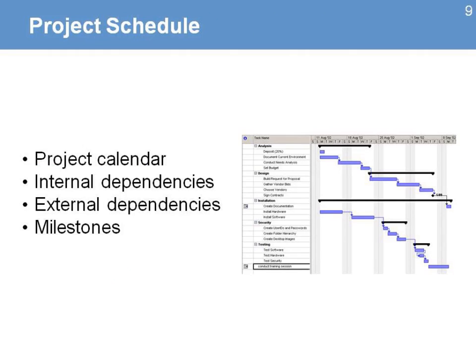Then you look at the schedule. You present the project calendar as it is at the moment of the proposal, and you highlight some of the internal and external dependencies — those areas where the project depends on the provision of information, support, or resources from other units or organizations — and milestones that have been agreed on by the donor.